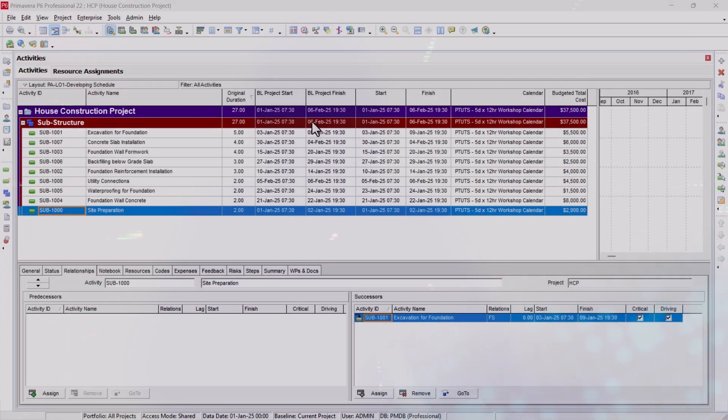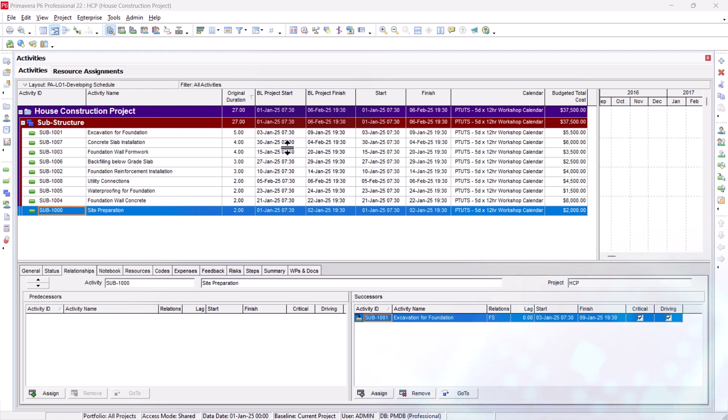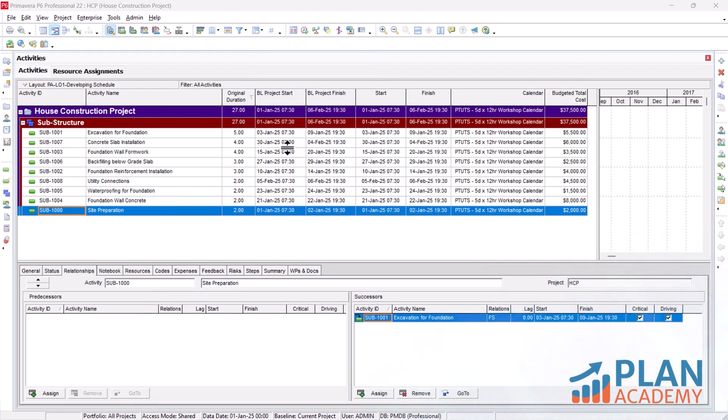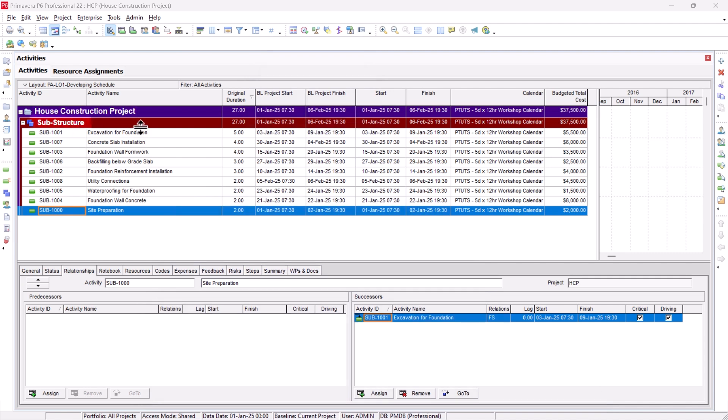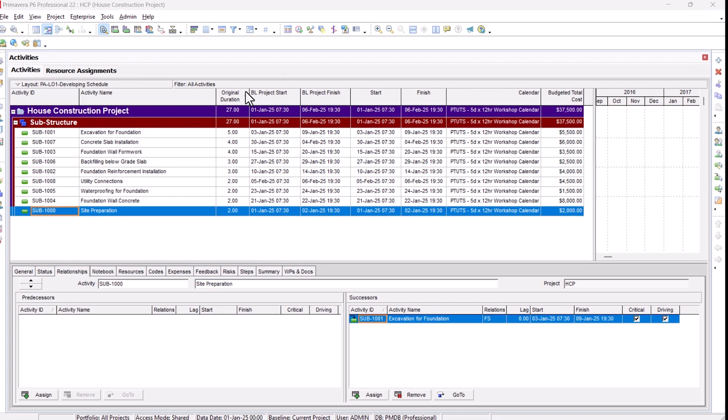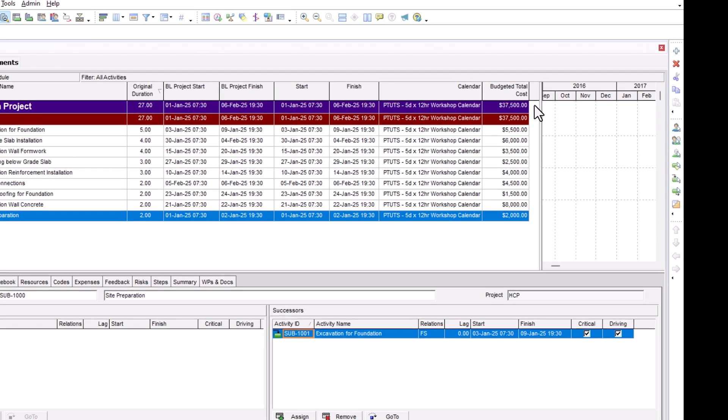The most important thing is your Primavera P6 schedule should have a cost loaded to it. As you can see here, we have a house construction project which has only a substructure right now and it has a budgeted total cost of $37,500.